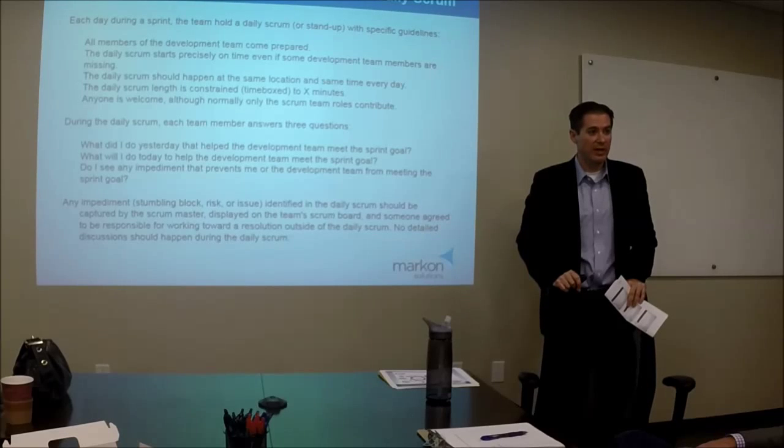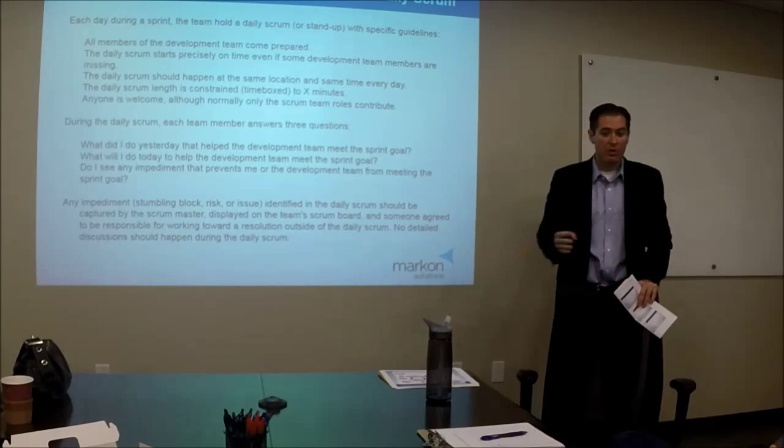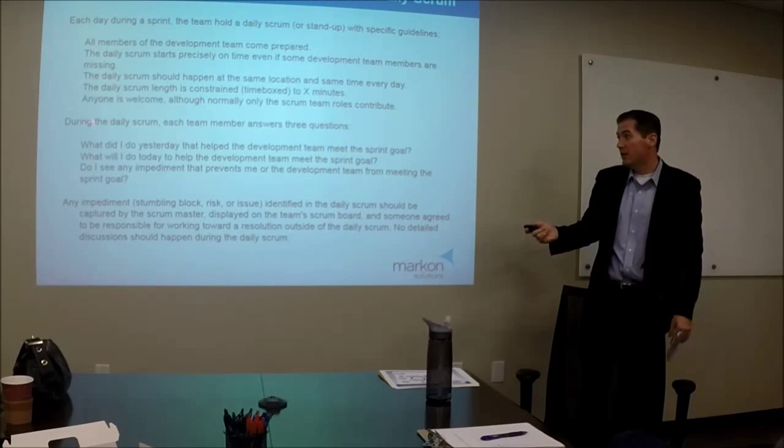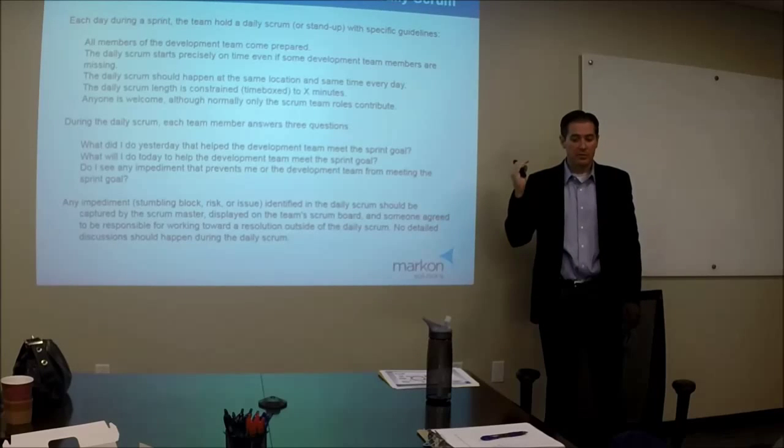and you should time box your meeting. The goal is not to have a meeting that drags on forever. The meeting has a format. The format is, what did you do yesterday? What are you going to do today? What's getting in your way? What are your impediments? That's it. No one can say anything else.